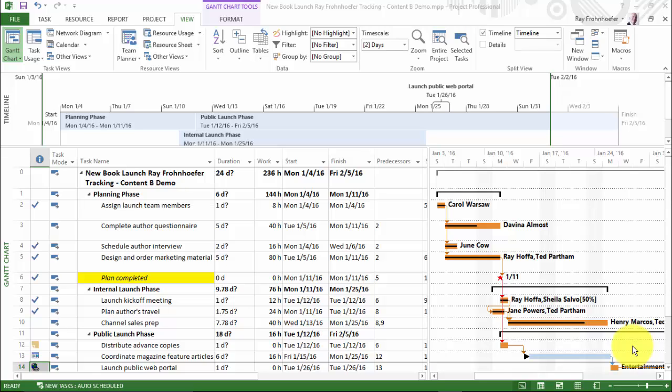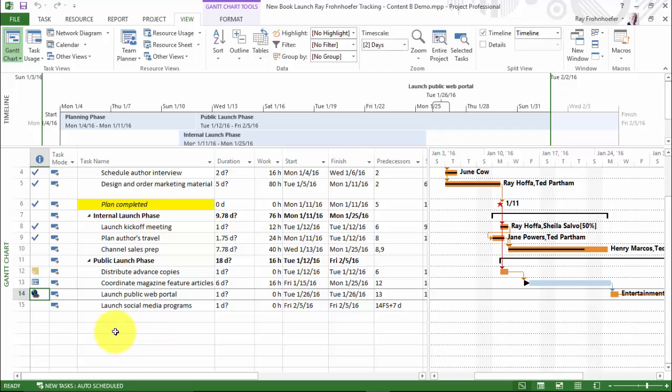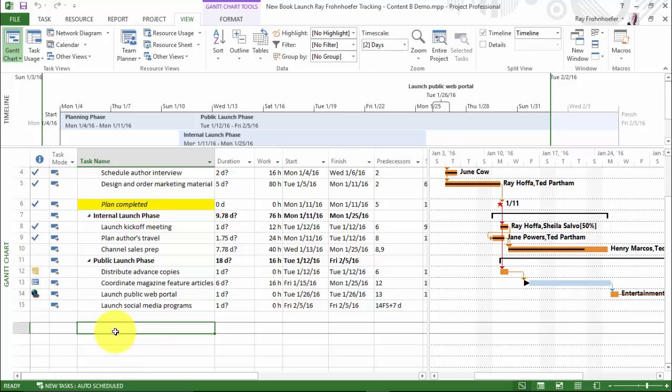In this navigation session, we'll look at adding recurring tasks. Now, recurring tasks are very useful, particularly for reminders. The reminders might be about any kind of review or meeting, like a risk review or a communications plan review, a status meeting, a budget meeting, or maybe just simply that status reports and status updates are due from the team. So recurring meetings, I typically put at the end of the plan, and I like to skip a space to keep it separated from the rest of the plan.